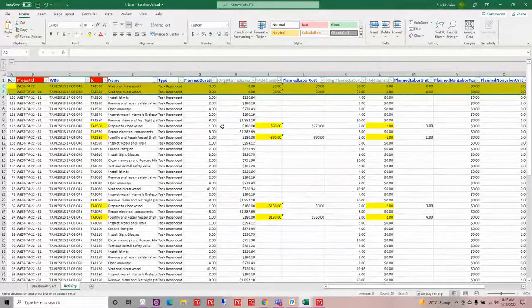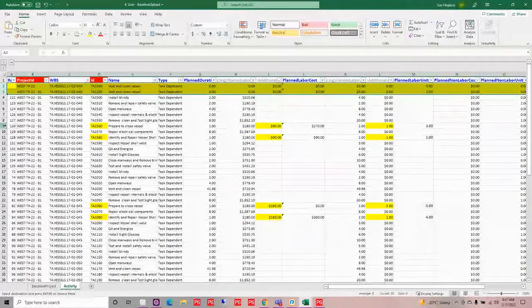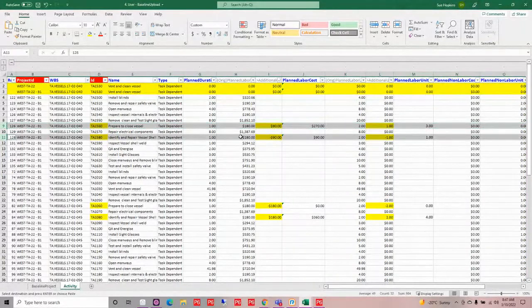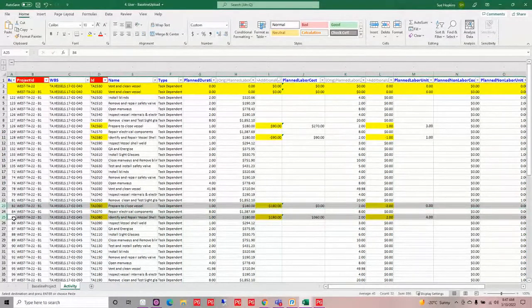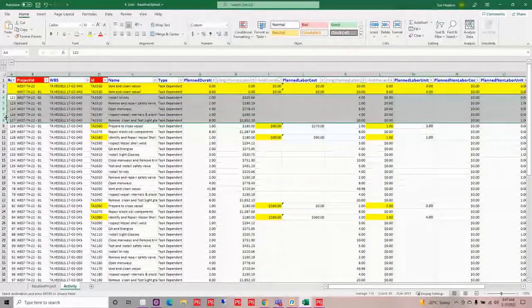And then I've got some of the items here on these two activities that I'm kind of debiting and crediting, moving some costs around, moving some units around to reflect what actually happened or started off as the project. Something changed. I had to make this baseline, and then something changed afterwards. So I'm going to go ahead and do that for those two activities as well as these two activities. Now, I don't have to load in all of this other information because I'm not doing any changes on these ones that aren't highlighted.